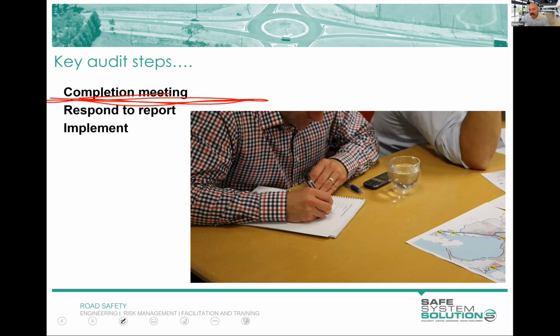It's not your responsibility to check that they're doing things. It's not your responsibility to say, yes, I approve that response to that finding. That's their stuff to do. As an auditor, I love getting the final product where they've said, yeah, we're going to do this one and this one, but we can't do this, instead we're going to do this. I like to see that, but it's not required.